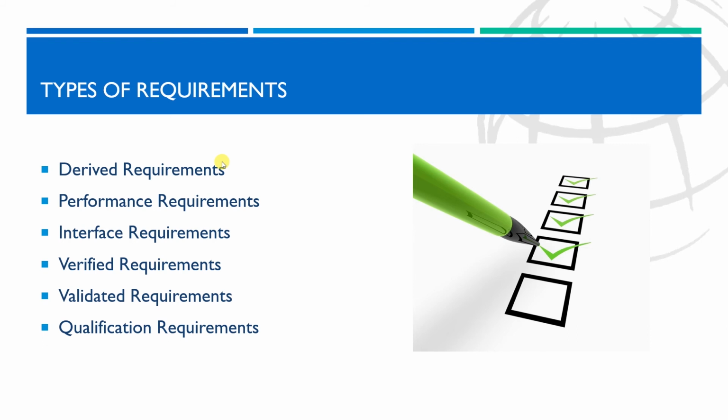One project team member should be assigned principal responsibility for assuring coordination of interface requirements, and we have some tools or methodologies that are useful for this kind of requirements. For example, the UML with the class diagram.